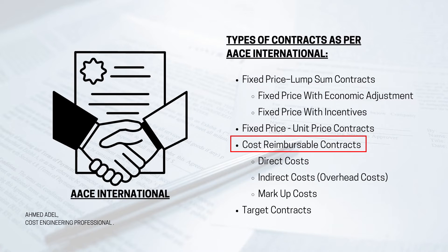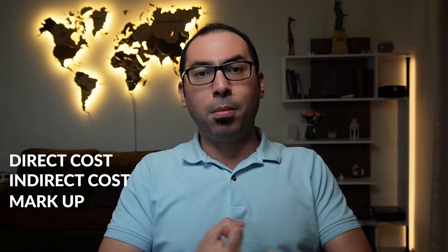The third type is cost reimbursable contracts. Here, the client agrees to pay the contractor for three things: direct cost, indirect cost, and markup. The contractor starts work, calculates direct costs — materials, equipment, manpower, subcontractors — plus indirect costs such as overheads, plus an agreed profit margin, perhaps 10%, 12.5%, or 15%. The client pays all three components.